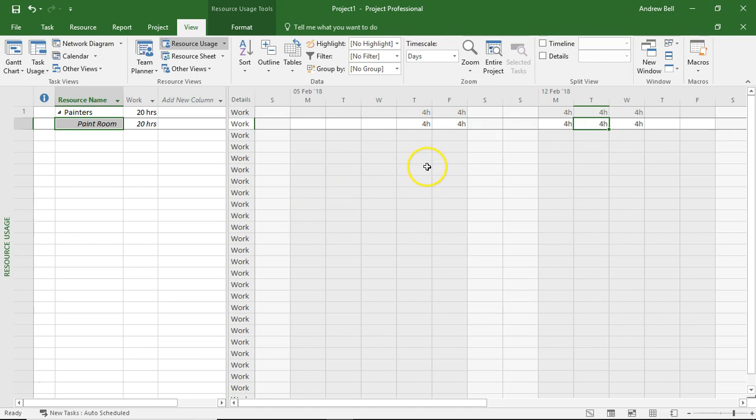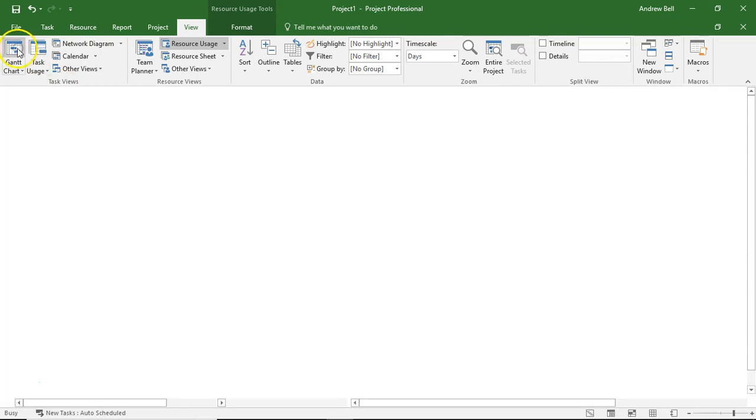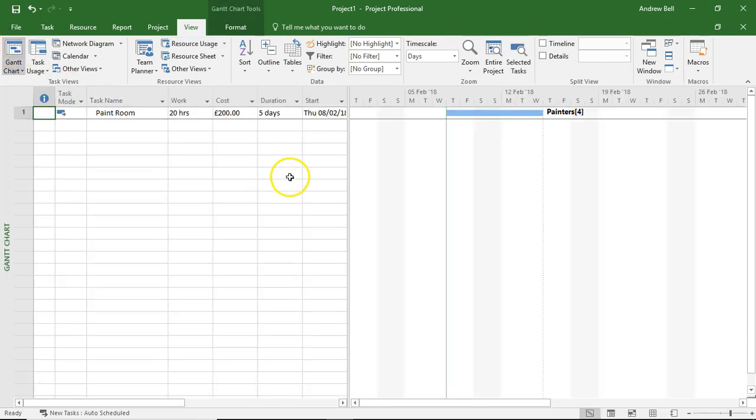Now, this is really important when we're stacking up lots of tasks for the same resources, because we will see whether the resources become overloaded, i.e. do they work more than eight hours a day?